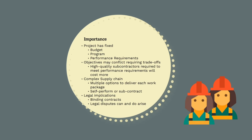Construction projects have a fixed budget, program and performance requirements. They are competitively tendered between multiple general contractors, and the winner always has low margins and a tight program to achieve. Getting procurement right is critical to ensuring the project can be delivered within these constraints and the head contractor makes money. We need to competitively procure work but also need to be choosing subcontractors who can do the work on time and to the required quality standards. If we select a subcontractor who has a low price, we may suffer delays or poor quality of works. Conversely, we may not have the budget to use a high quality subcontractor. Program, budget and quality objectives need to be carefully balanced to ensure we get the best possible outcome.